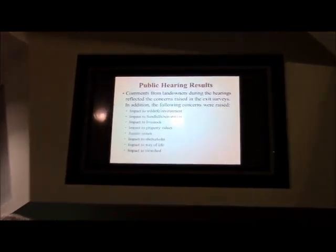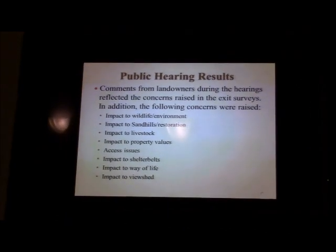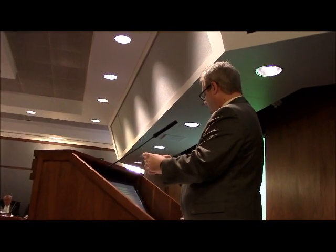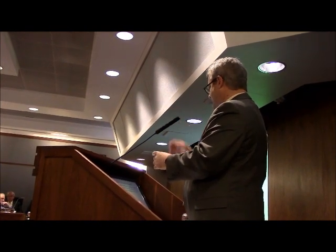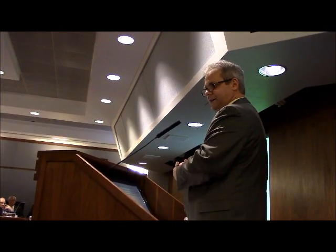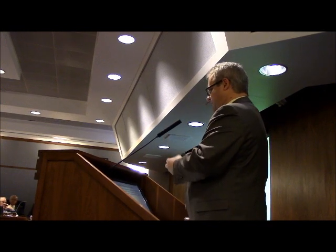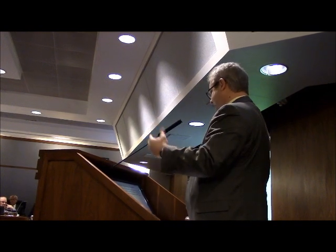So if you've got a mile strip of a 345,000 volt transmission line, I think in our example we calculated that was about 24 acres under that mile strip. The part that we really need to work on from a minimizing impact is the foundation part. And we also have impact issues when it comes to the wires and lines, and we'll have to deal with those and make sure we're doing those right in terms of how they interact with wildlife. But some people have the impression that this is going to be a scourge. No.